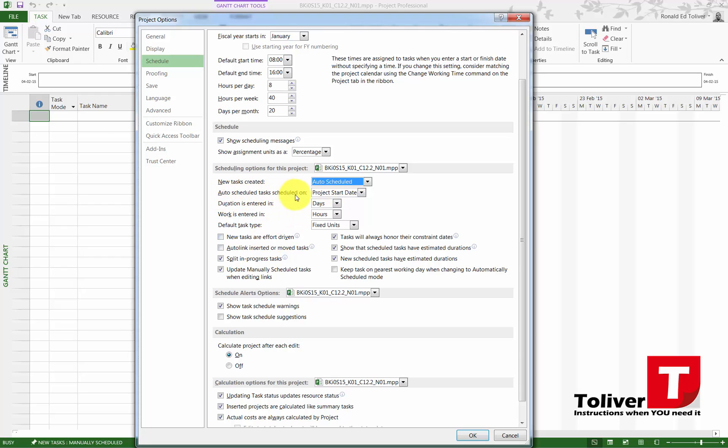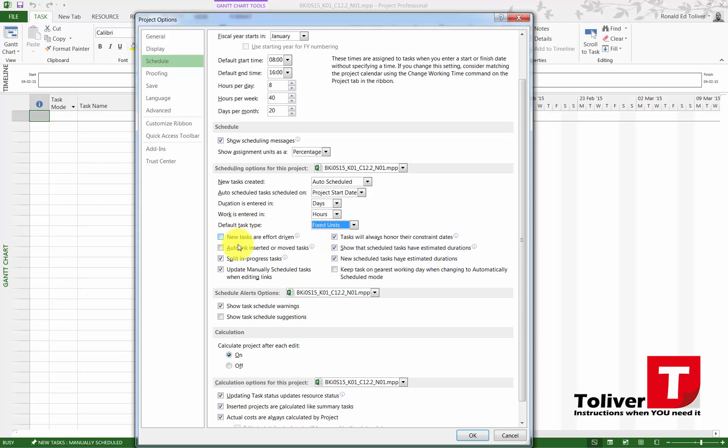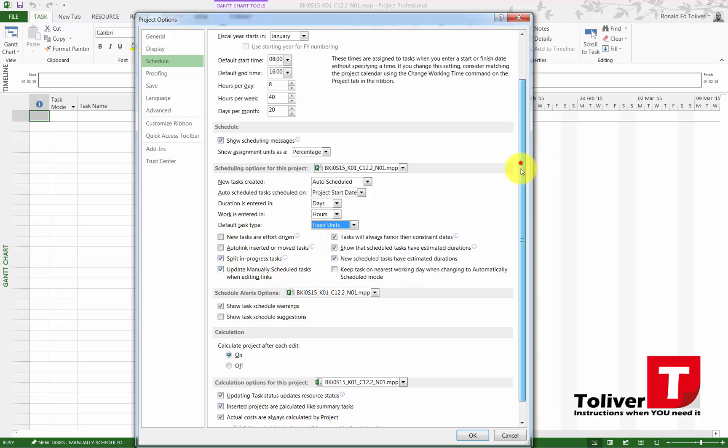Tasks are scheduled for project start date. The duration is entered in days. Work is entered in hours. And default task types are entered in fixed units, not fixed duration, not fixed work—fixed units.